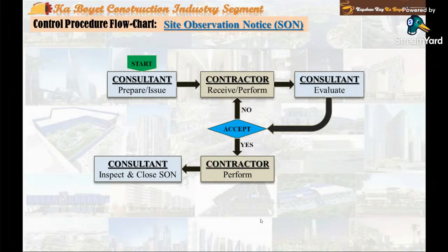Very important note. The contractor should take one first. The contractor should take the initiative of putting on hold the specific work activity described in the consultant-issued SON until the issue is officially resolved, to prevent